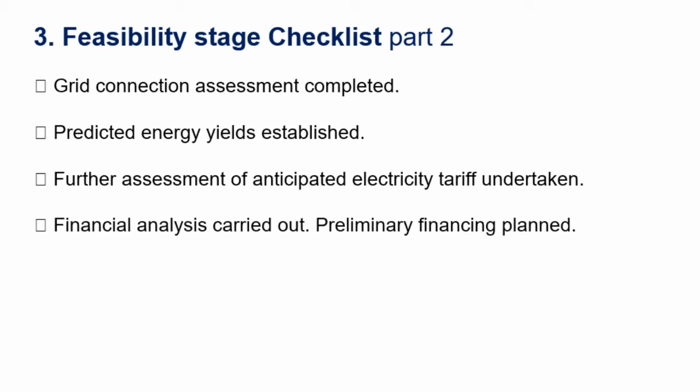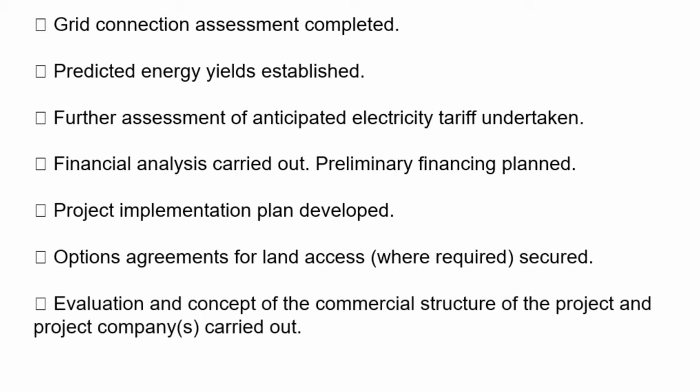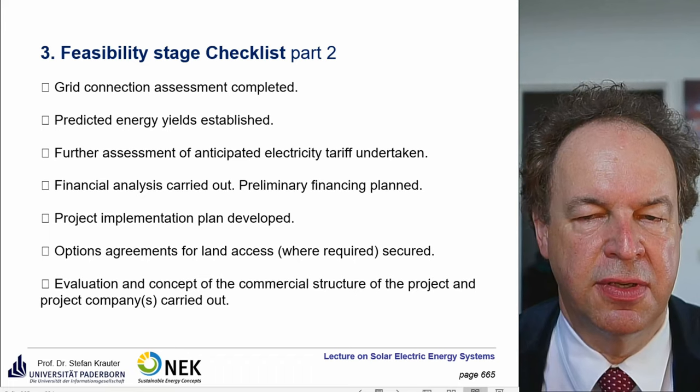A financial analysis is carried out, preliminary financing planned. The project implementation plan is developed — what are the timeframes, how long does each task take, with some reserves. Options agreement for land access: you need access not only to the land where the power plant sits, but also to carry out maintenance and repairs — so if you sell the land later, you still need to ensure you have access. Evaluation and concept of the commercial structure of the project and project companies are carried out — as mentioned, this is done through a special purpose vehicle.